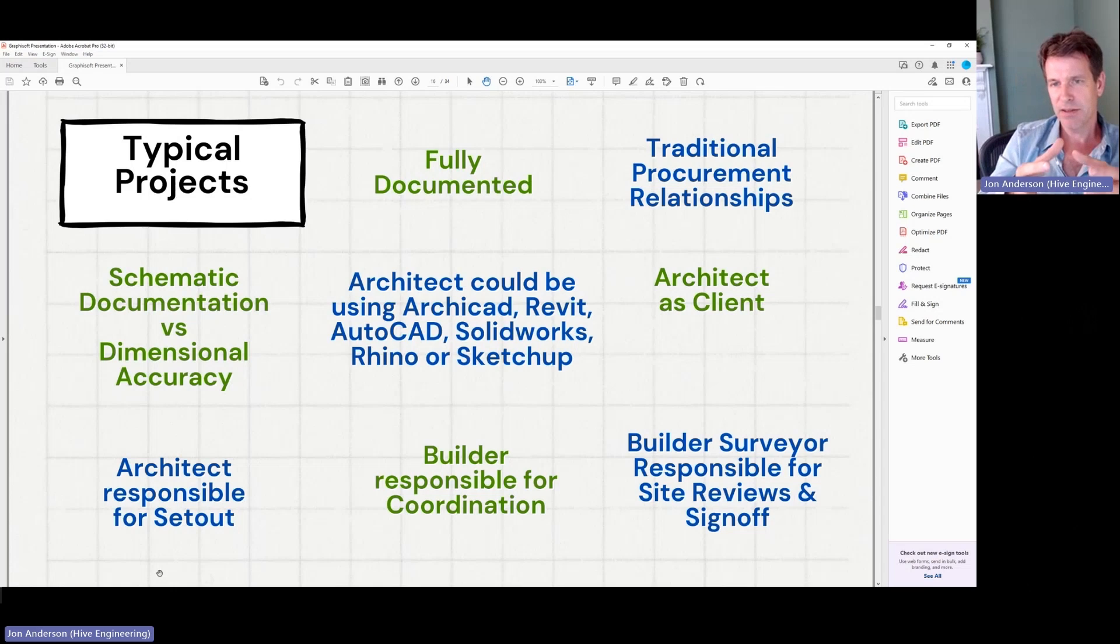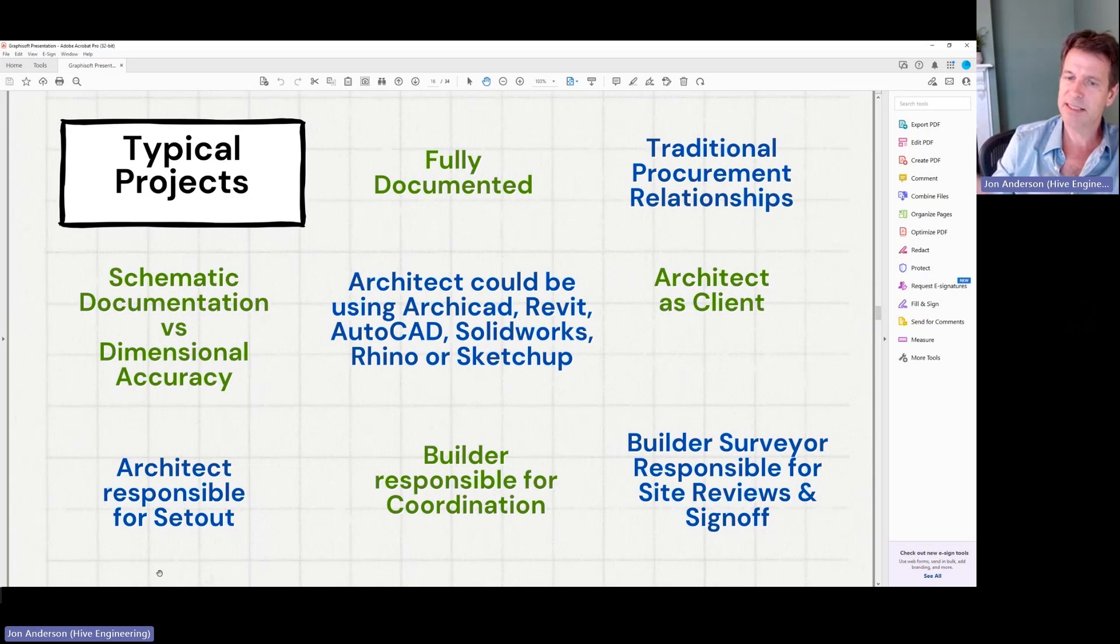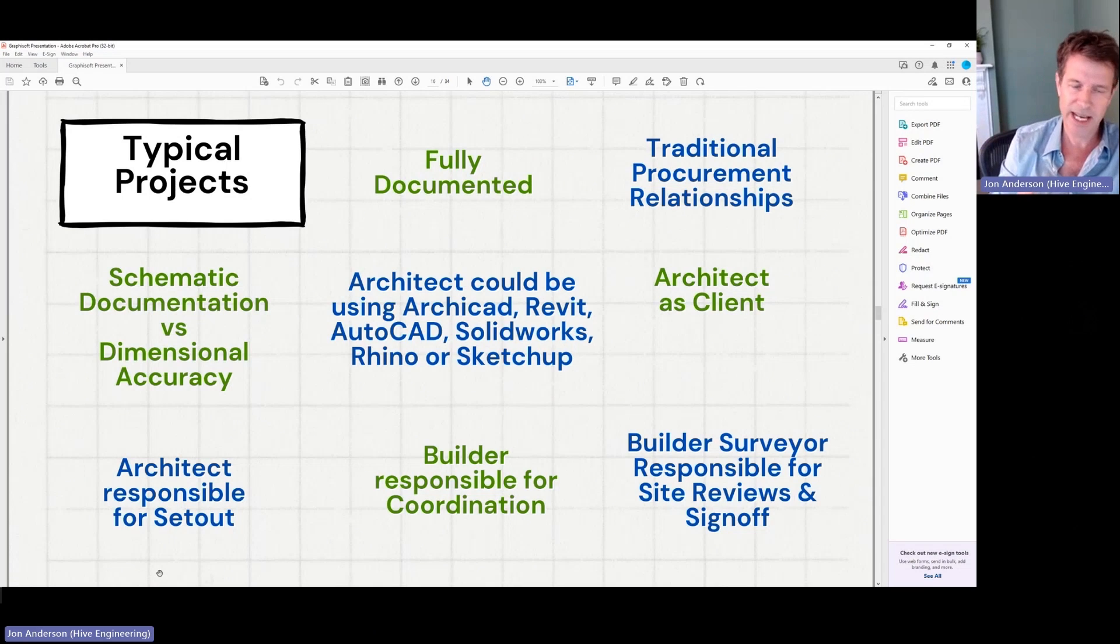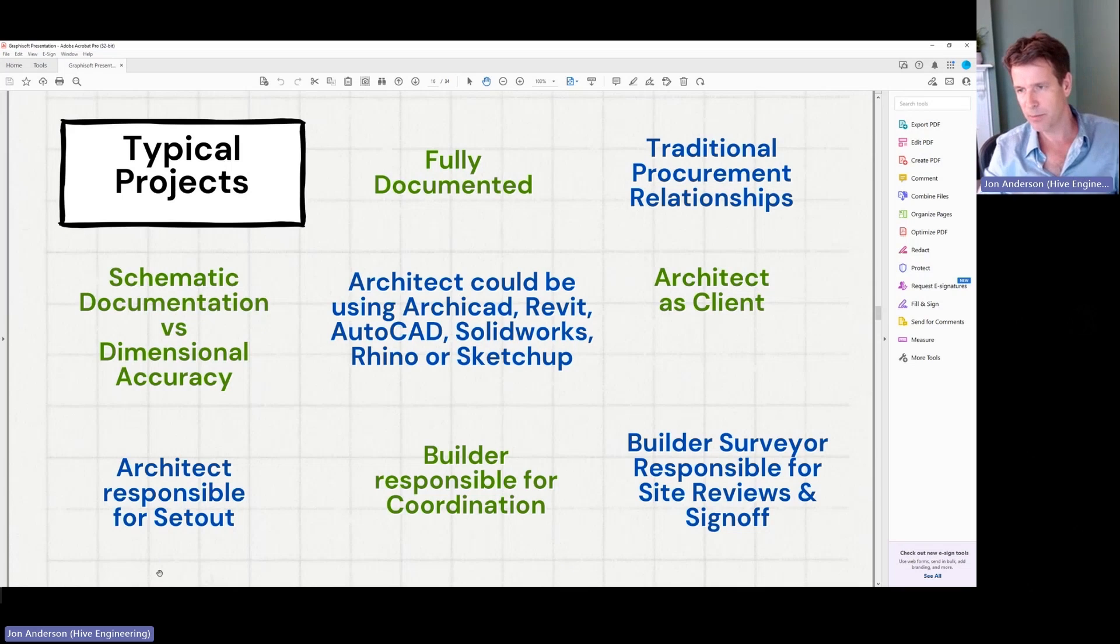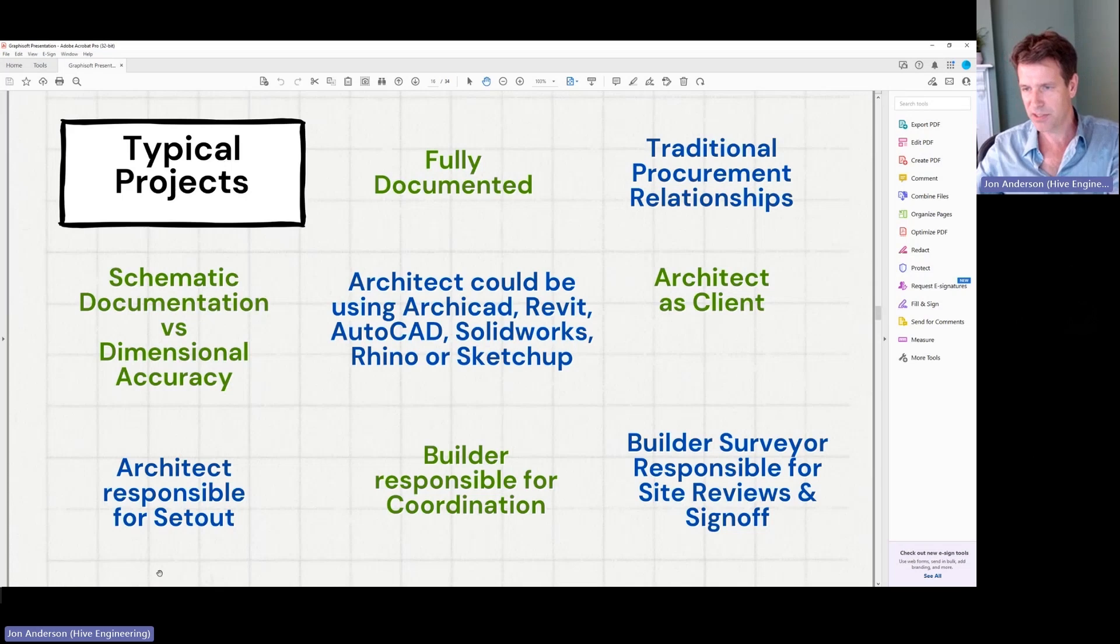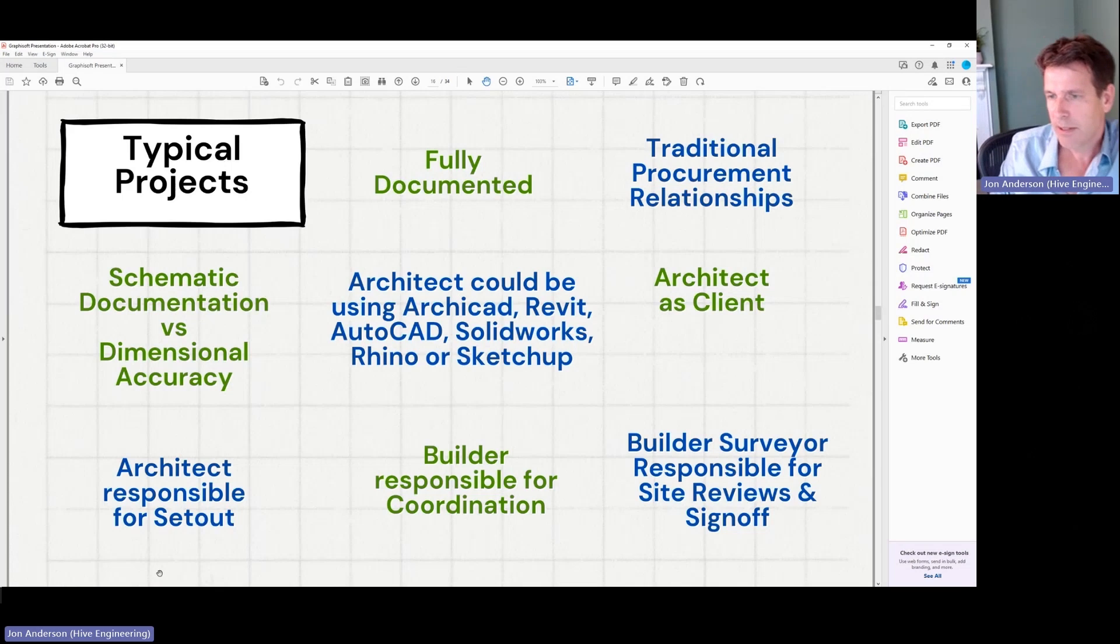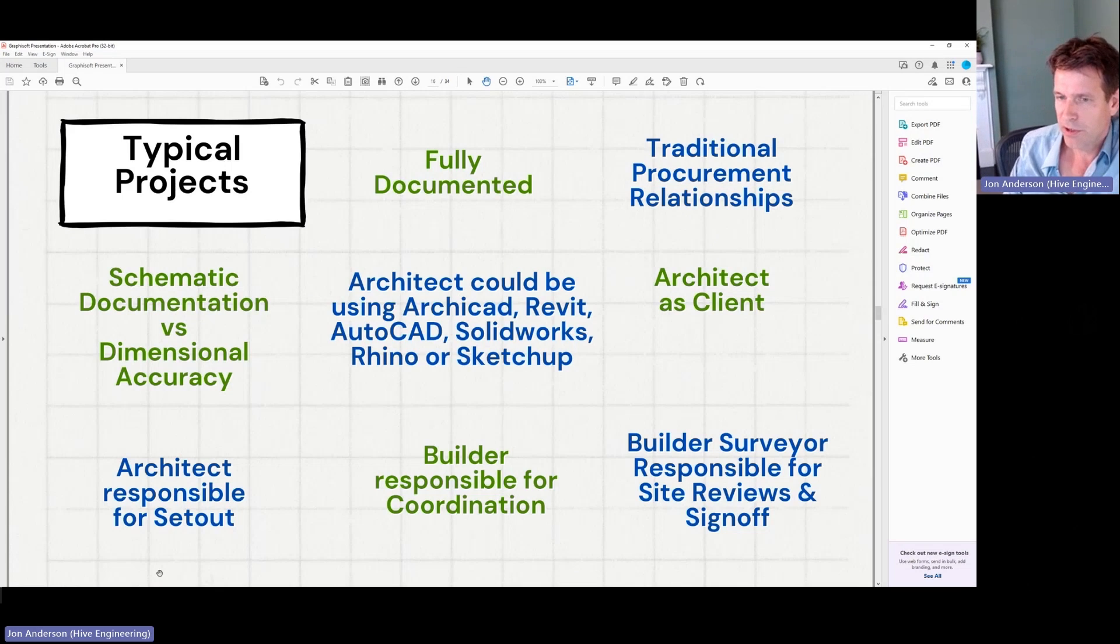I tend to have projects that are what we would call a traditional procurement in that you've got a client and they're basically putting it out to tender and then a builder would engage to build it and we're engaged by the client, we're not engaged by the builder. So that keeps it, that's generally the type of projects I work on.